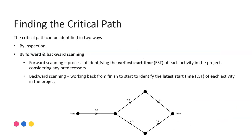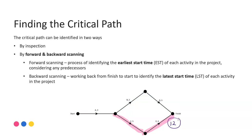When finding our critical path, it could just be by inspection. If we know that the critical path will be the longest sequence from start to finish, looking at this very simple network here, we have one option going activity A, B, and D - that pathway takes three plus two plus three, so eight units of time. There's also a second possible pathway: A, C, E - and that pathway, three plus five plus four is equal to 12. So the longest pathway from start to finish would be our critical path and also our minimum completion time.